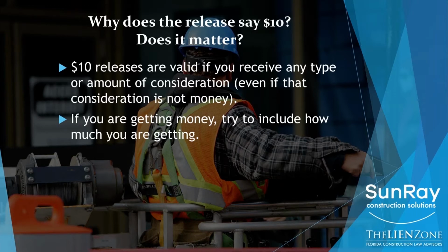You're a subcontractor on the job. You've sent your notice to owner early because you've signed the contract, but you're still waiting to show up on the job. You really haven't done any work. Now that the owner and the contractor have your notice to owner, they need a release from you, but you don't have any work. You haven't done anything. You haven't submitted any bills. Issuing a $10 release at that point is perfectly fine as a sub, right?